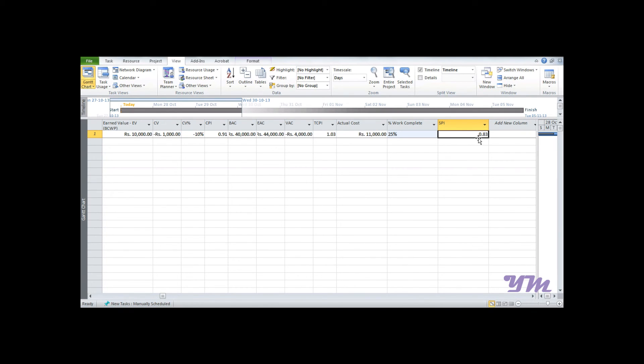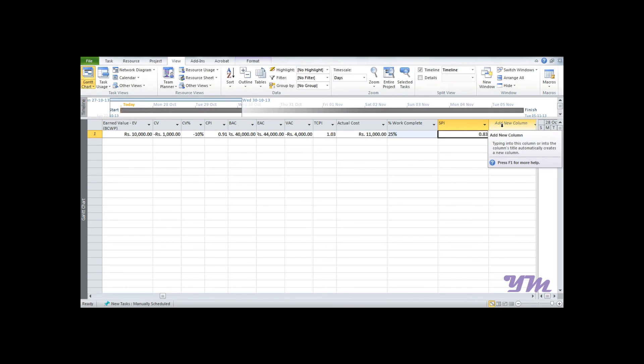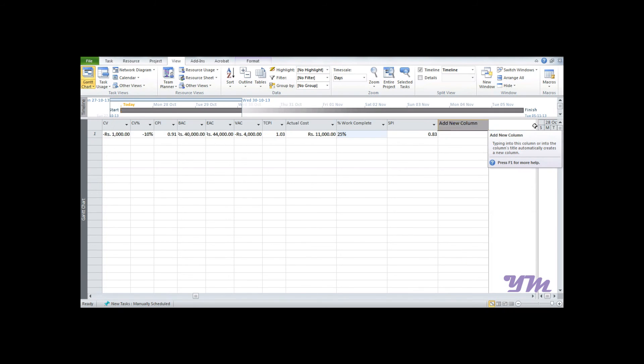Now if you want to find out or forecast the duration, we have the formula: duration by SPI. So we will add a new column.